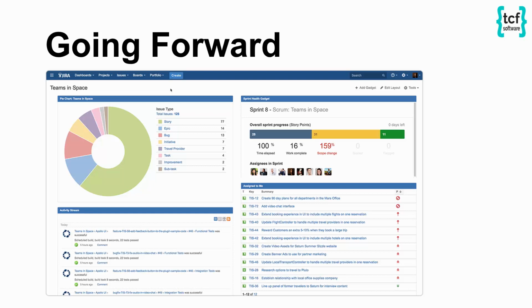We would need to go to monthly billing, invoice you every month, but we can produce you a monthly report from Jira, quite detailed. It's exactly what we've done, and as I said, you can cap the amount that you want to spend. So we can talk about that and agree how to go forward with that.